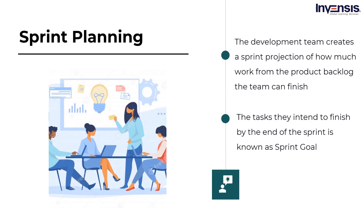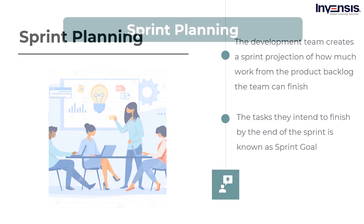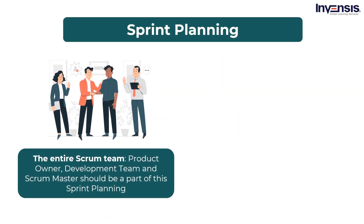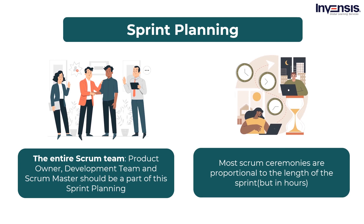This volume of work is added to the sprint backlog. During sprint planning, the team should discuss and create a sprint backlog that includes all of the tasks they intend to finish by the end of the sprint, which is known as the sprint goal. This goal needs to be agreed upon by the entire team. The entire Scrum team — product owner, development team, and Scrum master — should be part of sprint planning. Most Scrum ceremonies are proportional to the length of the sprint. For sprint planning, the meeting should be twice as long as the sprint in hours. For example, if the sprint is one week, then sprint planning should be around two hours, and if the sprint is two weeks, then sprint planning should be around four hours.